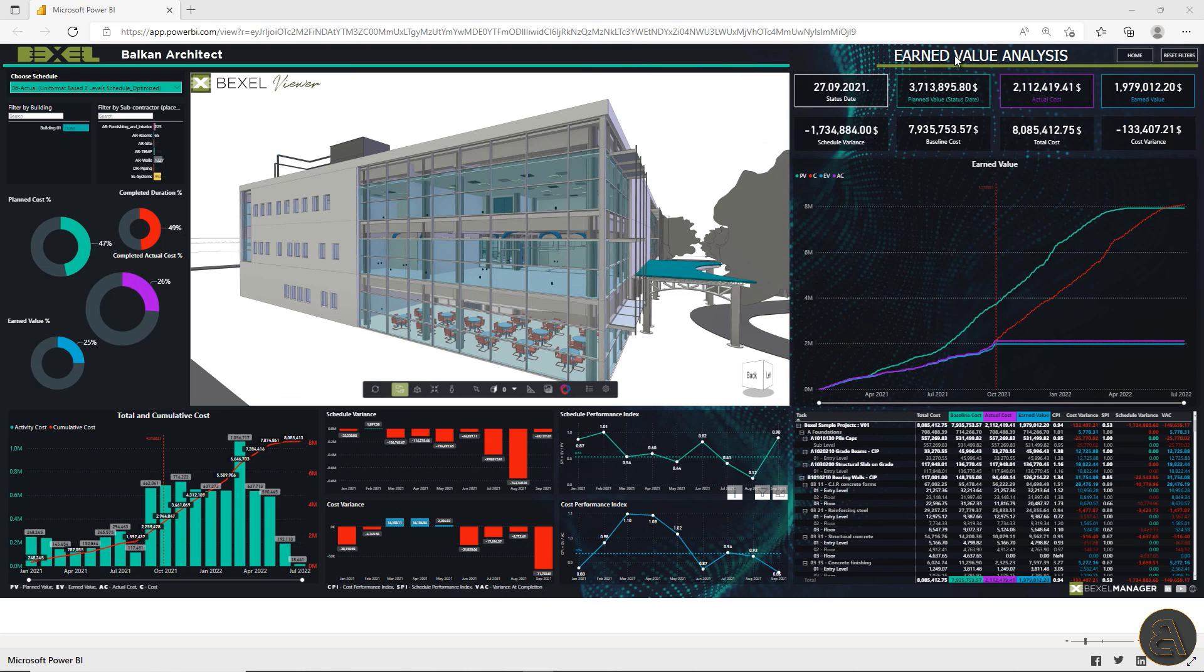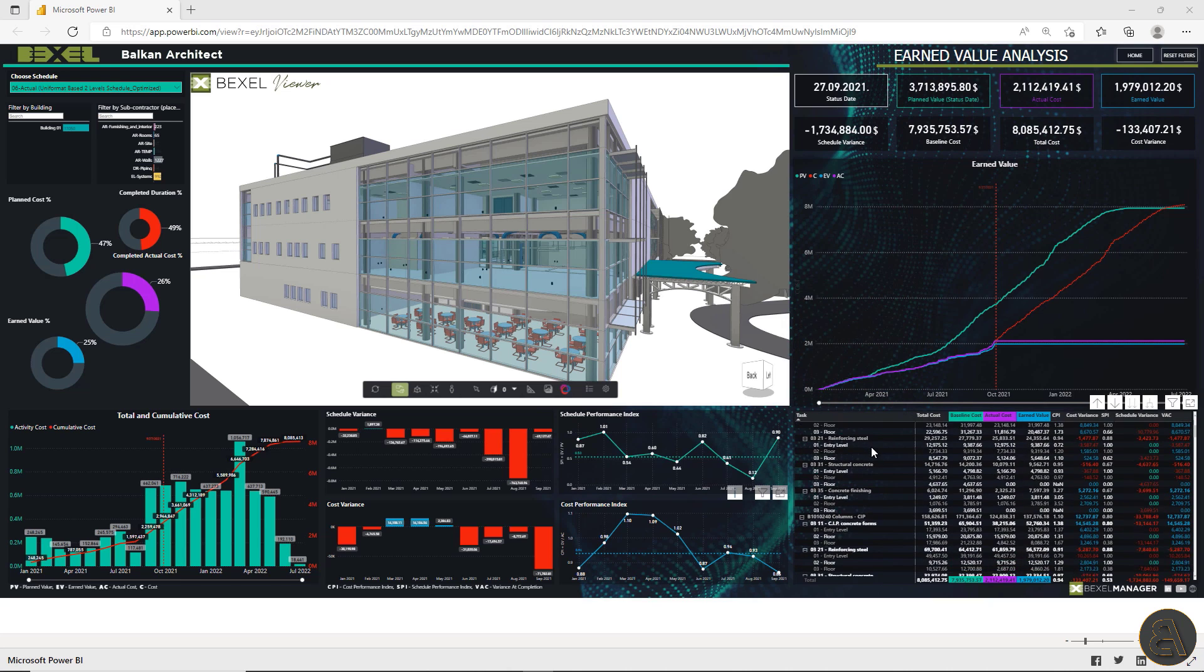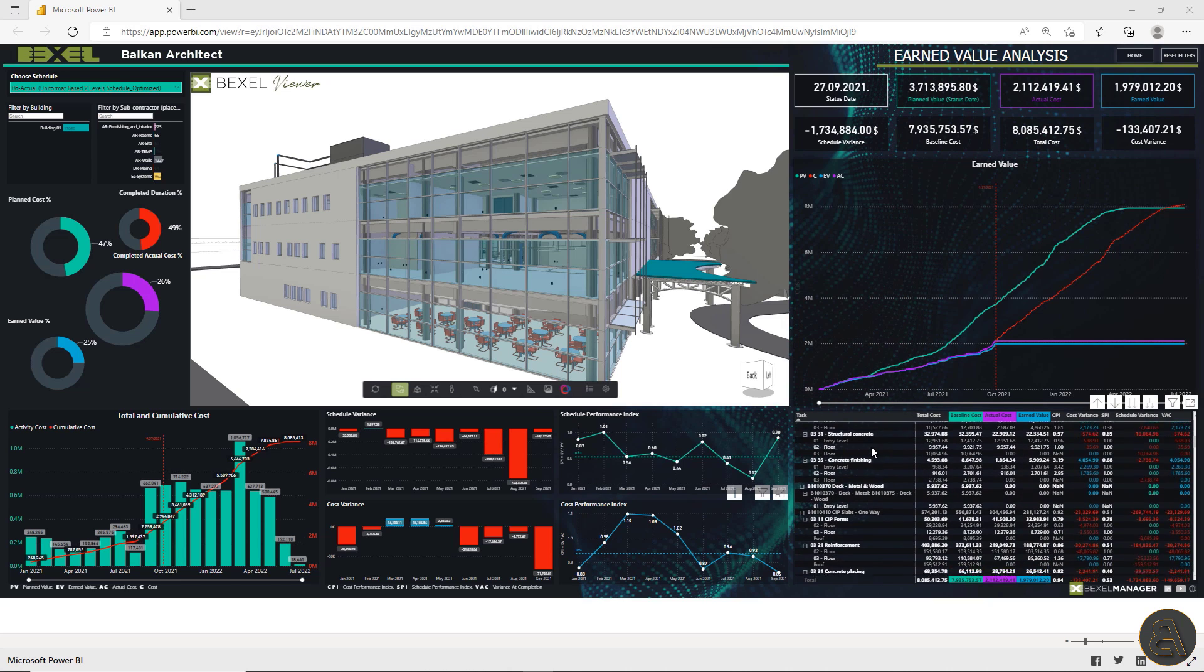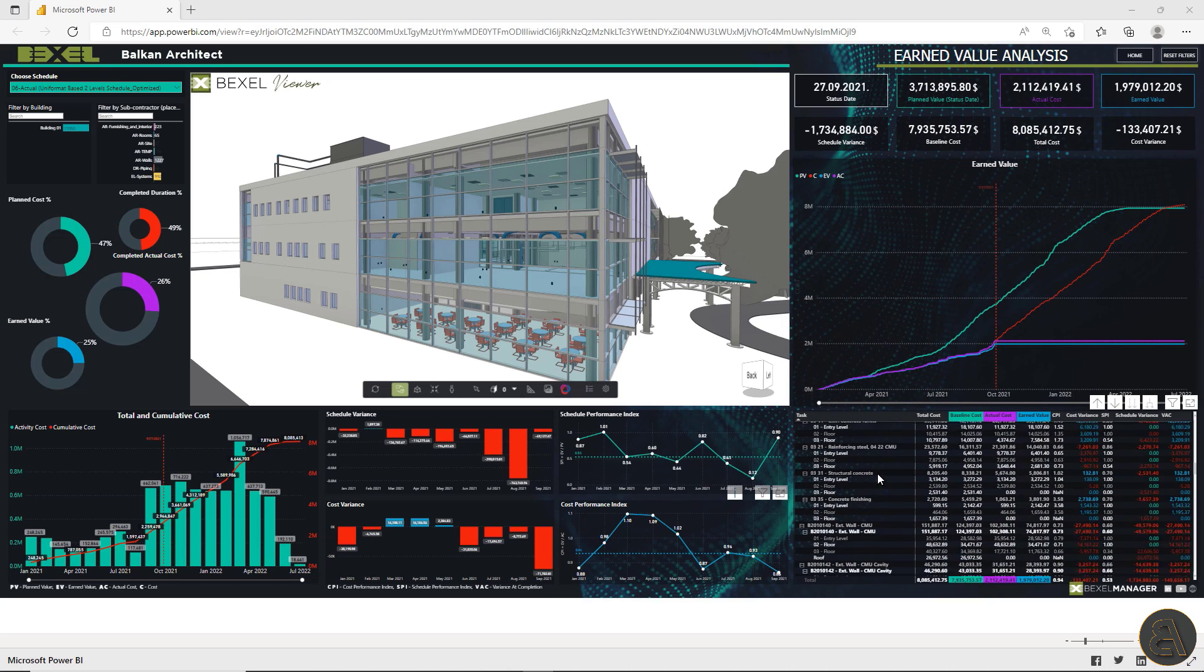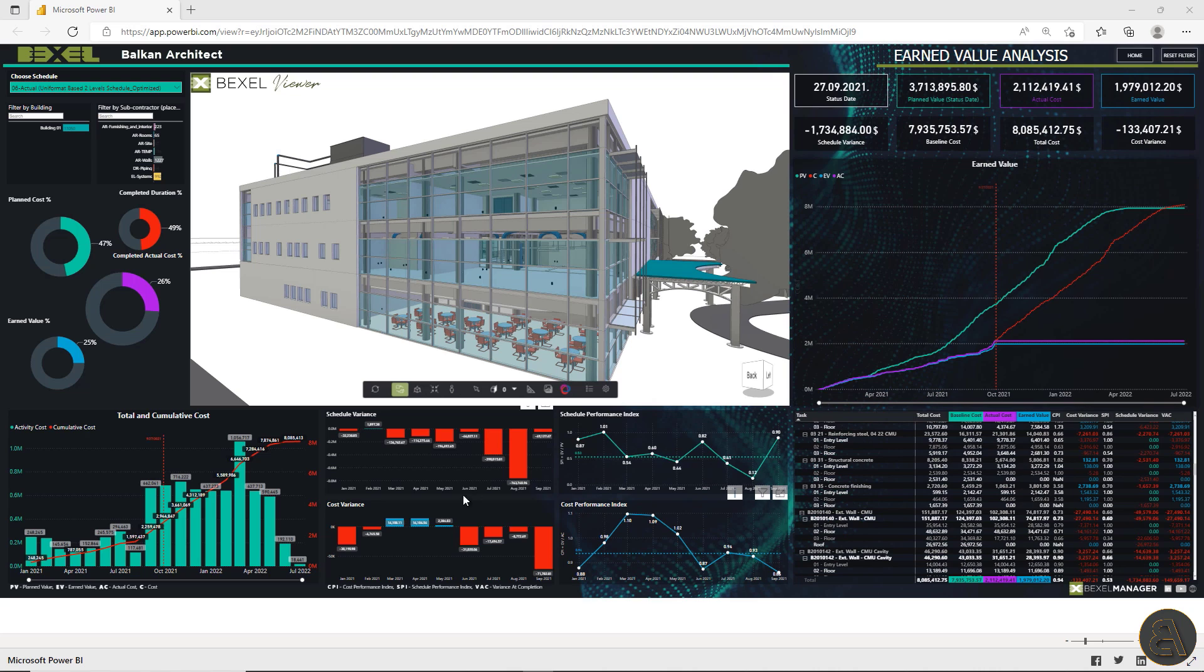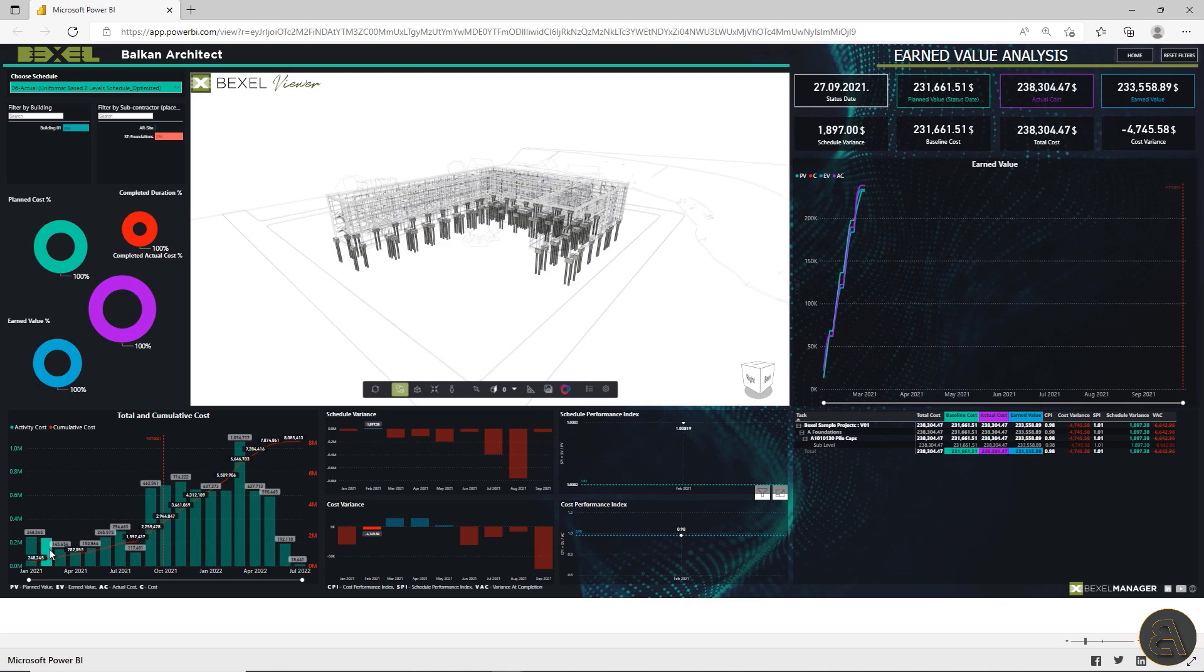Okay, next one earned value analysis. Here you can measure the amount of work actually performed. Check actual costs, the status date, cost and schedule, variance schedule and cost performance index for the whole project or selected period.